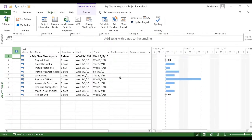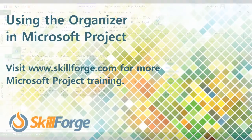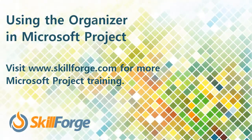Since the calendar rules the schedule, and since it's good practice to create and apply a calendar before adding tasks, resources, assignments, and so on, this is probably one of the most important time savers in the entire program.